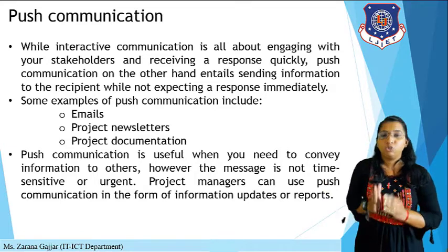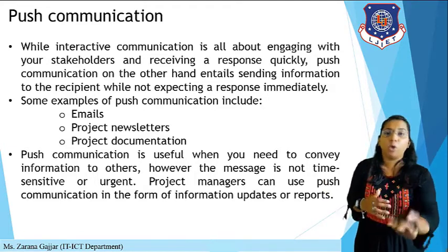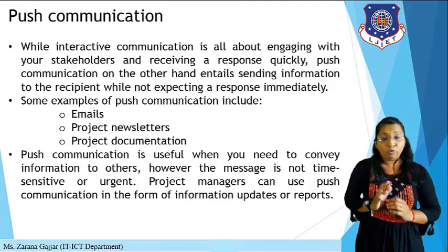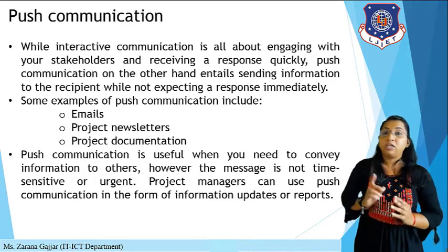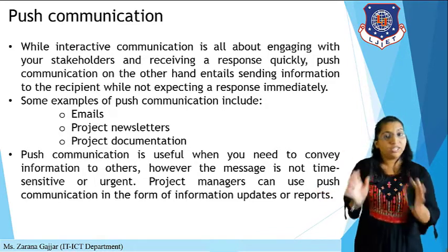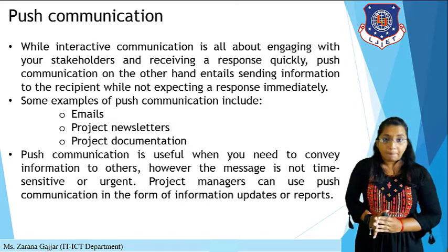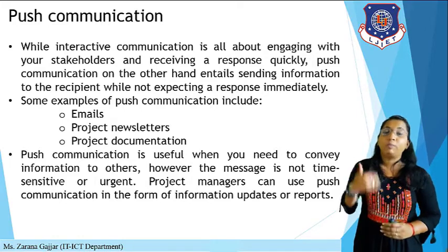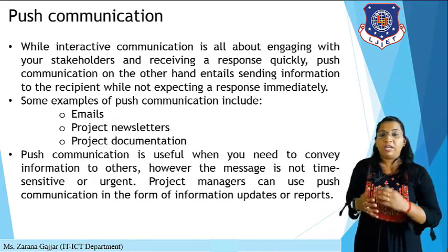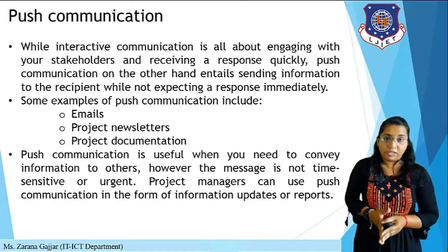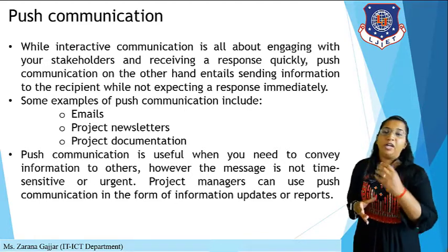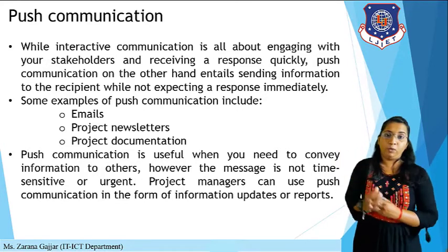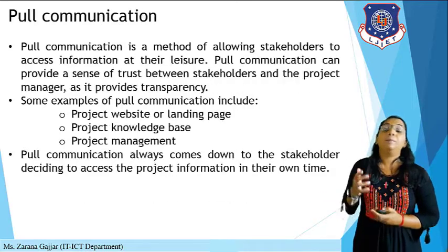Push communication is useful when you need to convey information to others, however the message is not time sensitive or urgent. If you have an urgent and immediate communication, then go with interactive communication. If it is not like that, then push communication will be better. A project manager can use push communication in the form of an information update or a report. So if it is something like the actual progress report, what is ongoing, that will be a kind of push communication. If you want to provide some information, that will be push communication, right? And the third type is pull communication.